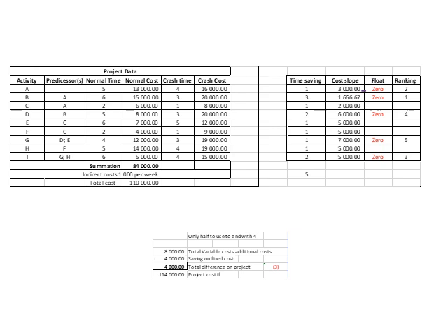Once you've established your cost slopes, you can start ranking your items. You will see here I also indicated that there's zero float on these items. If they fall behind, the project falls behind. So very important to note that.